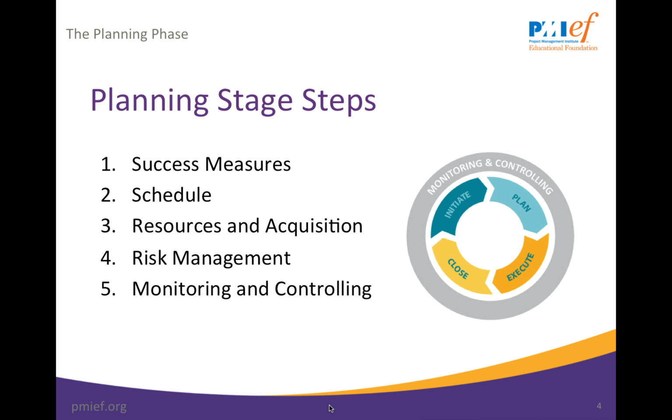I want to emphasize the importance of careful planning to ensure that the final project is of good quality and that time and resources are not wasted. You started the planning section of the student project plan. You may discover you need to revise the defining section. This does not mean that defining was done incorrectly, just that ongoing and iterative planning is a key aspect of good project management and is sometimes referred to as the rolling wave planning.